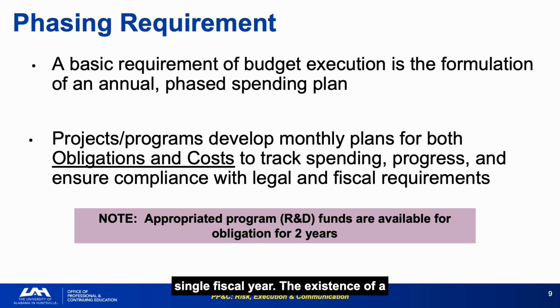The existence of a 2-year availability window does not alter the expectation that funds be obligated in a timely manner, consistent with the work plan. Excess carryover is still a management concern. Plan your obligations to match your work schedule, not to maximize the use of the 2-year window. Using the window as a planning crutch creates the unobligated balance problems described in the next few slides.